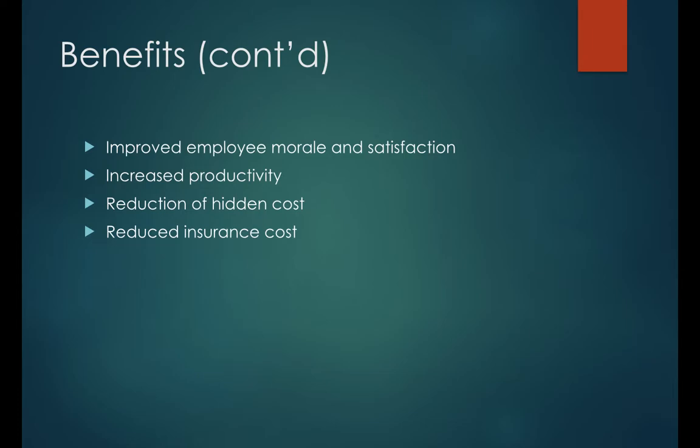Owners and clients are not going to be willing to work with you because they're going to notice that you've had too many injuries on your project, and you might even be disqualified. Some RFPs have even said that we want to see your log and your number, because insurance is going to skyrocket, and that already says something's going wrong with your team.